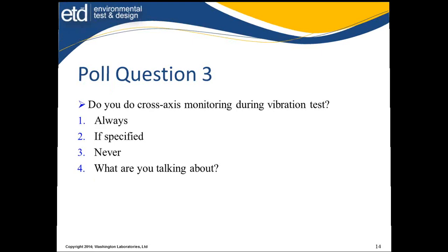But don't depend on it. Help keep the lab communicating. Don't expect schedule compression. It seldom happens. If you think I'm going to make up for it by doing 3 shifts instead of 1 or something else, unless you've arranged for it, it's likely not to be an available element.